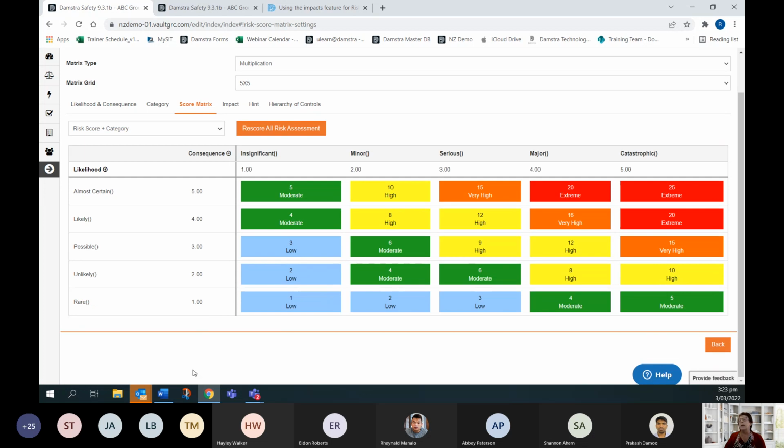And you'll see this is what my risk matrix looks like now, with a 5 by 5 if the likelihood was almost certain and the consequence was catastrophic. 5 by 5 is going to be an extreme risk, and it should go in my critical risk register. As I went through these tabs and you're busy trying to write down what it looks like because you want yours to look like it, don't worry about it. I've taken screenshots for you and we'll put that in the chat for you.